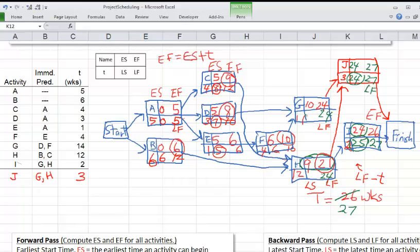So here we will have, that was 24 minus 14 is 10, and here 24 minus 12 is 12. And so it looks like the numbers for the bottom numbers for G and H will not change. So from there, if we were to continue with a backward pass, the other numbers are not going to change in the bottom.